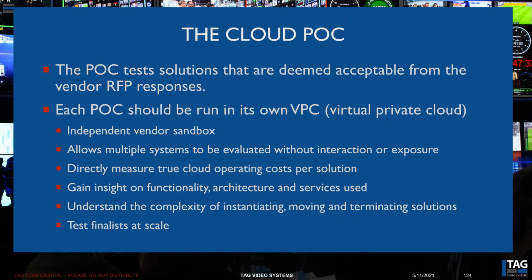You can directly measure their true cloud operating cost per solution. This is really key, because now I did my spreadsheet, I figured out what I thought they would cost, they told me what they needed to run, but when I run it, I can really see the truth. And I can gain insight on the functionality, architecture, and services used. My team can actually use the system and make sure it meets their requirements. Operations can become satisfied with it. And I'll understand the complexity of instantiating, moving, and terminating solutions. I'll see how long it takes to stand a system up, how long it takes for the vendor to solve issues. It'll be really instructive.